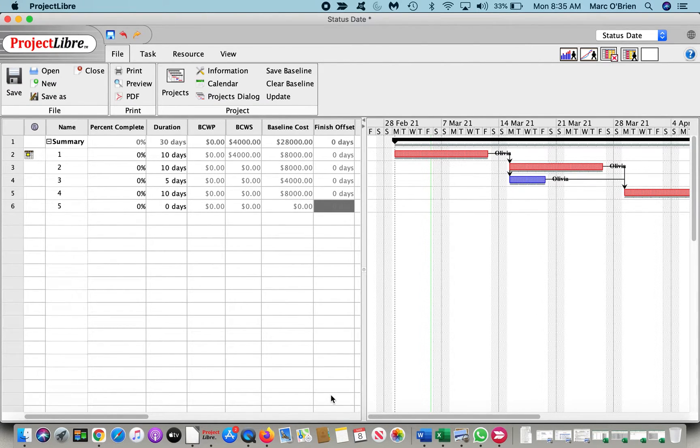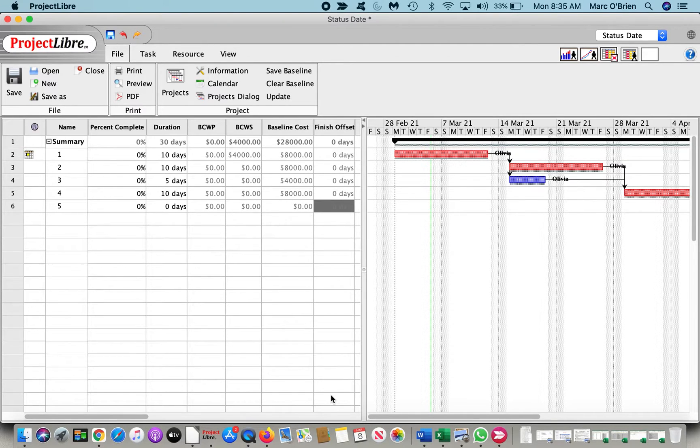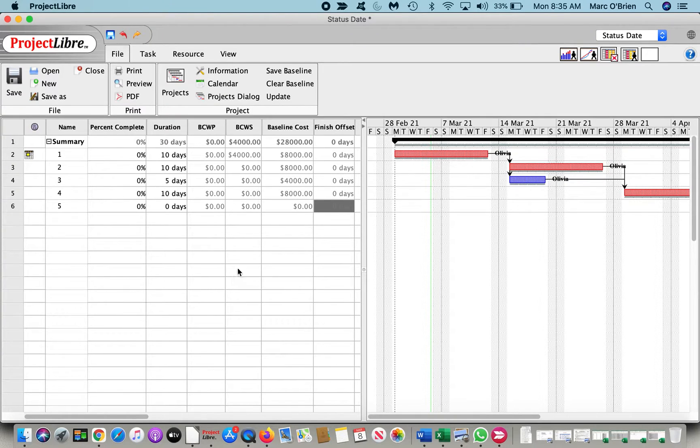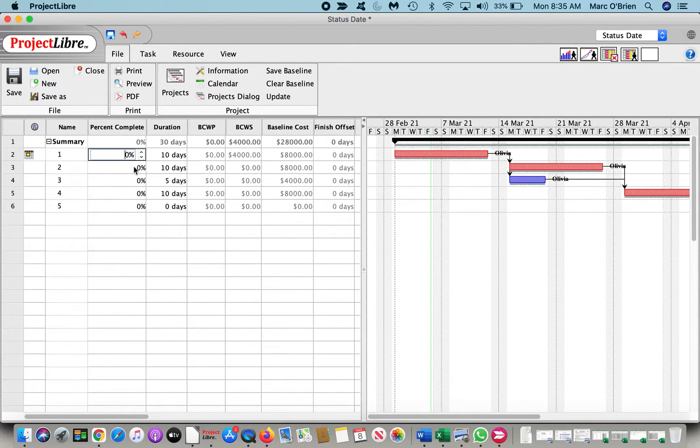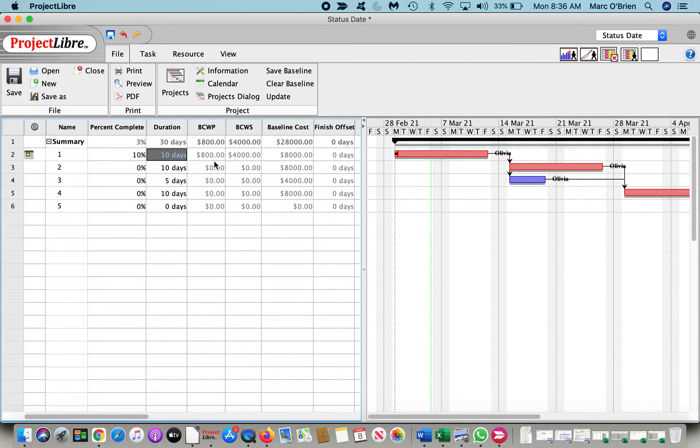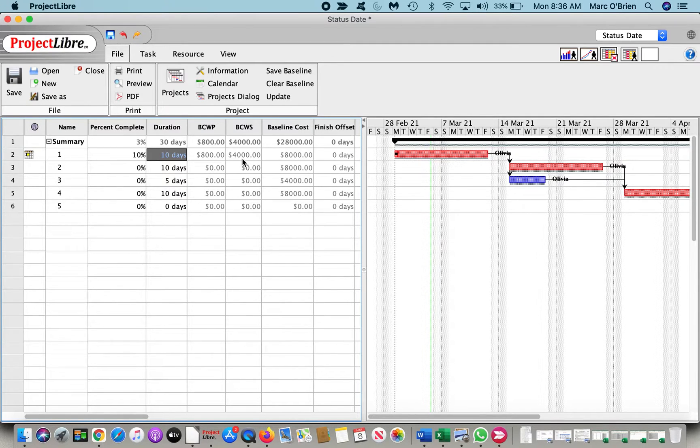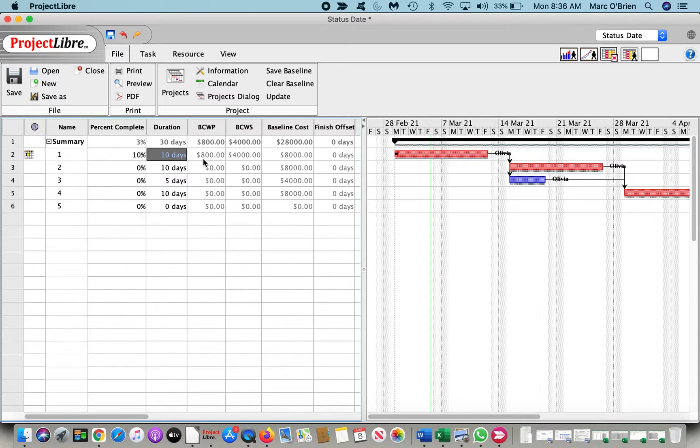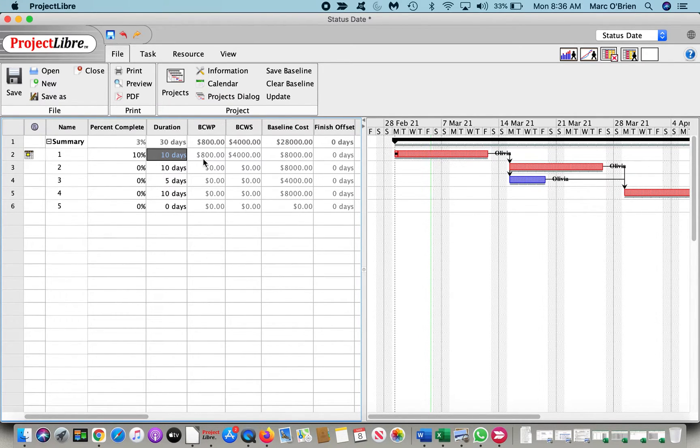So what we're saying, again, is that 50% of task 1 should be complete through that status date. Let's go through on percent complete and say instead of 50% complete, it is only 10% complete. Now that's the budgeted cost of work performed, so if we were on schedule, we would have completed $4,000 worth of work or half the work. However, we are not on schedule. We've only completed 10% of it, so our budgeted cost of work performed is $800.